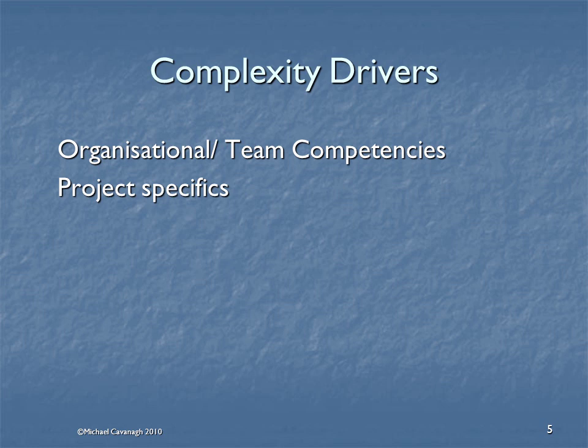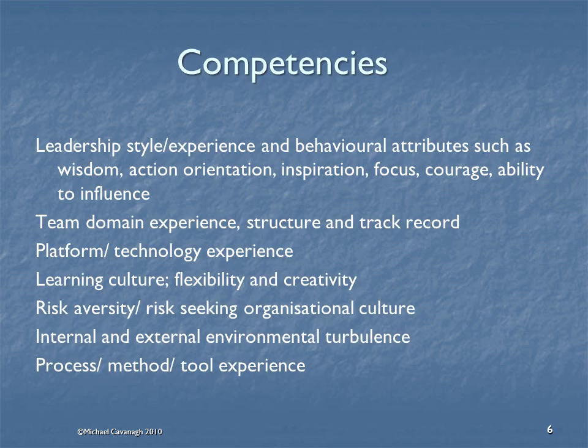To address complexity, we have to address the two basic dimensions that form complex issues: the competences of the organisation and the team, and the specifics of the project at hand. These combine to give a level of complexity. We are talking about leadership and team experience and behaviours, experience in that platform and technology, and risk-aversity. The more complex the project, the higher the risk — and if the organisation has a risk-averse culture, it will find great difficulty in making rigorous enough risk planning. We also consider turbulence of the wider environment and experience generally in the processes, methods and tools.